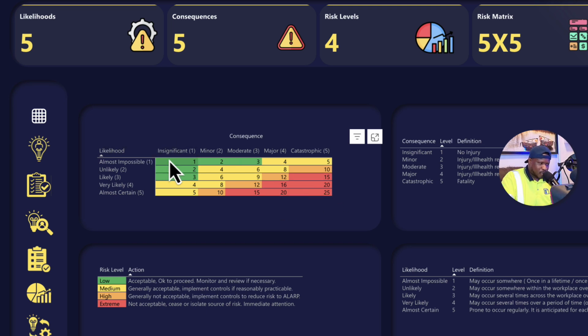The minimum is 1. Now, for us to compare risk levels or have a risk scoring criteria, which helps us to make proper decisions, we need to be able to convert all of this to percentages. So we can actually estimate percentage risk levels based on this scoring criteria. The maximum is 25. The minimum is 1. At any given point, there's a risk level. The risk level divided by the maximum will give us the score. Basically we multiply by 100 and we get a score.